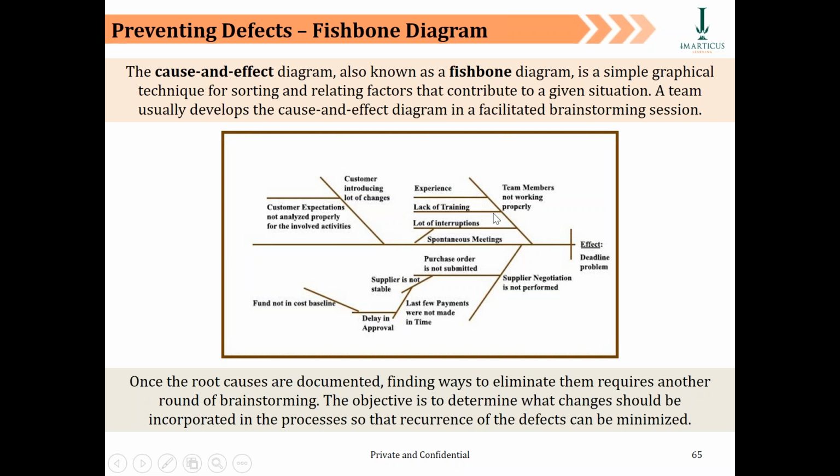So what is the advantage of this? You as a Scrum Master can make use of this fishbone diagram to show the cause of the defect and its effects as well. So it can be a one-to-many relationship between the cause and the effects. If you create this and walk your team through it, the functional and technical consultants get a lot of help, and they are able to come to a quicker conclusion in terms of how to eliminate these.